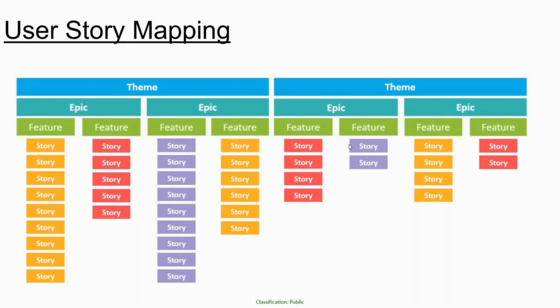first of all, that folder which has the list of all the user stories would be referred to as your product backlog, which means a repository of all the features, all the user stories that should be delivered as part of the project. When you place all of those together in a prioritized manner, like the top few user stories are the highest priority ones, and at the end are the least priority ones, that priority based list of user stories is referred to as your product backlog.